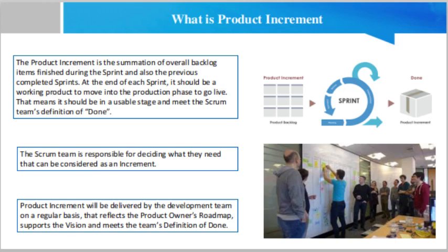When an organization or a team has the potential to deliver product increments, there will be some new forces in the organization, which include changes to the iron triangle or the triple constraint, as the sprint length is fixed. The time is also fixed, so cost and scope must be altered to support this change. There will be no late delivery. It becomes easier to report on delivery whether the increment is done or not. Internal silos that stop the development of the product increment will begin to dissolve as the team works cross-functionally.